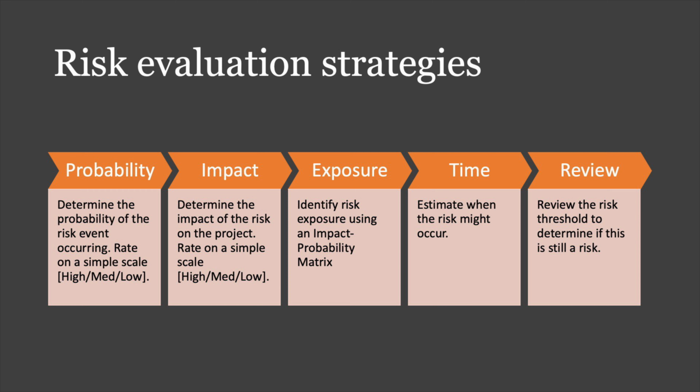So one way to look at it too is if you're trying to come up with some numbers, you want to look at your procedures that you have for dealing with various risks. So for example, if something impacts your schedule for more than 2 weeks, you might identify that as a medium risk or as a high risk. Or if something increases your project cost by 10%, you could identify that as a high risk. And you can come up with these values that help you classify these risks.